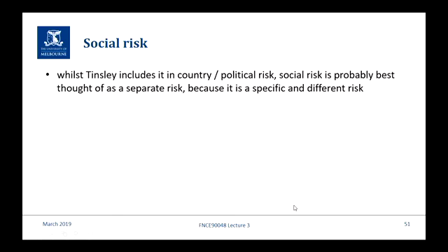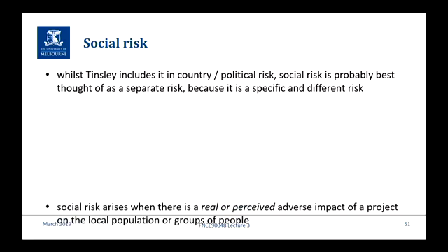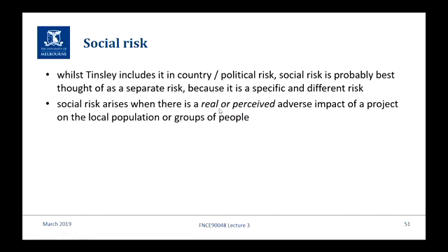Okay, the other element of this is what is known as social risk. Tinsley includes it in the country and the political risk, but essentially it is a separate risk because it's quite specific. And that is when there is either a real or a perceived adverse impact of a project on a local population or group of people. Now, a real adverse impact is something like having to bulldoze their homes, or operations that feed chemical waste into the river, that sort of thing.